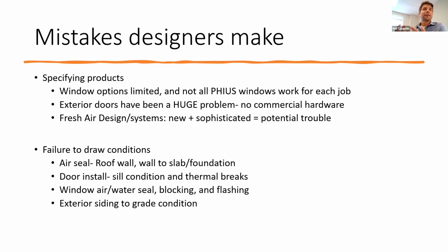The fresh air and design systems, we've had very different experiences. On one job, we had an engineer who'd done lots of systems and really just was able to plug and play. On the other project, the Hillside, they're still kind of redesigning and tweaking while we're roughing in. So those are just systems that, again, are worth questioning your designers on to make sure that they've really understood what they're trying to achieve, so that you're not just bidding on something that you'll find out later is not going to work.